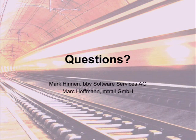No, they just coordinate each other. For example, we do every week smoke testing about non-functional things, and the 8 Scrum organization decides who will do it. So you don't have redundancy and do double work, stuff like that. So we do continuous testing every week, but you need the Scrum of Scrums to be sure who's doing it. Like one team says, okay, we have some capacity, we can do the NFR test this week or something like that.